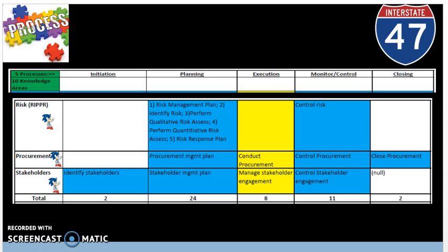So in this process, we are going to take in the project charter, which comes in along with EEFs and OPAs, to give us a stakeholder register and analyze the stakeholder importance using the salience model, which focuses on power, urgency, and legitimacy. Also, we'll be looking at the power interest grid, power influence grid, and influence impact grid as